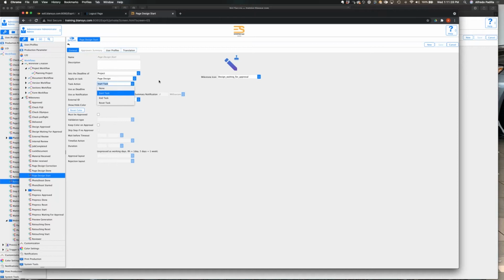This actually sets it up to communicate with the project task and tells it how many files it's gotten through here. So it kind of dynamically adjusts the project workflow to know how many files are being submitted to the document workflow and updating it. So the percentage would change and it'll actually show a finish based on how many it's received. So important to remember, and that's just in addition to milestones being able to communicate back.